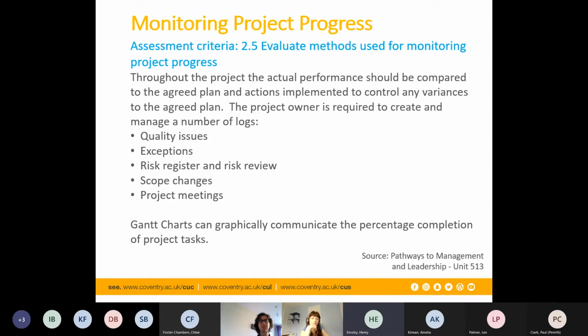Yeah, we do materials, plant and labour as well. So is that costs, or costs and volumes that you're doing? Yeah, the cost and volume. So we forecast and then we do a reconciliation as well to reassess where we overspent, and then we have to give reasons why we've overspent. So like on concrete or aggregates or asphalt for tarmac or things like that.